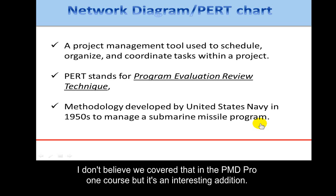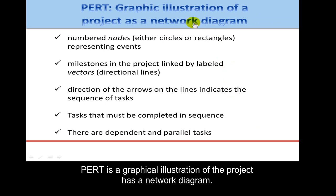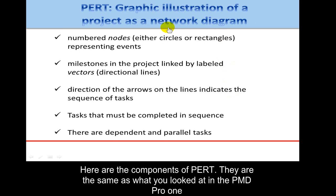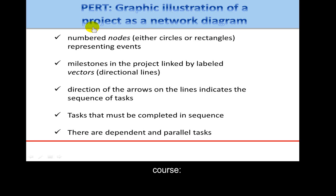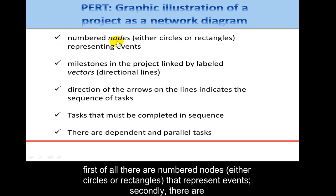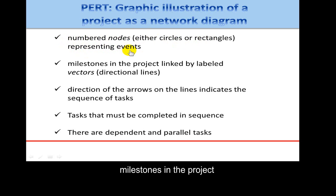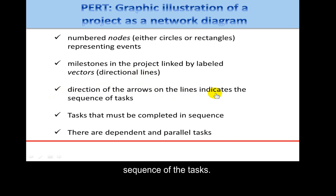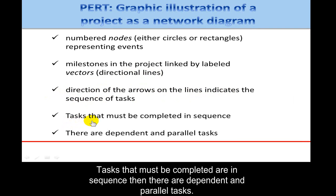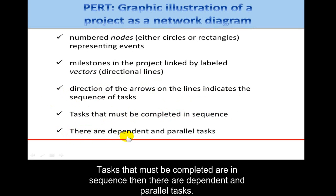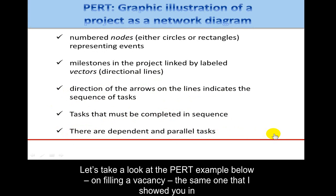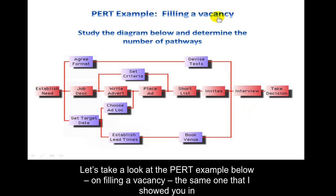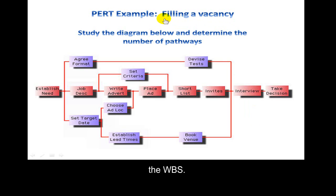PERT is a graphic illustration of the project as a network diagram. Its components — the same as what you looked at in the PMD Pro 1 course — include: numbered nodes, either circles or rectangles, that represent events; milestones linked by labeled vectors or directional lines; arrows that indicate the sequence of tasks that must be completed in sequence; and dependent and parallel tasks. Let's take a look at the PERT example for filling a vacancy — the same one shown in the WBS.